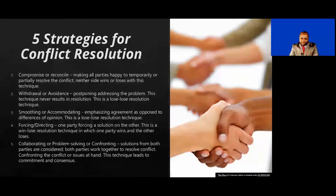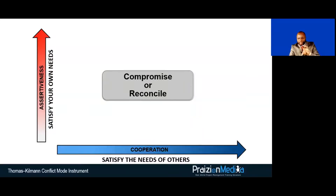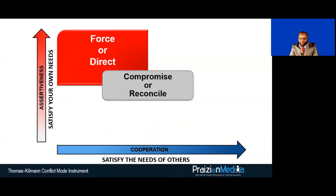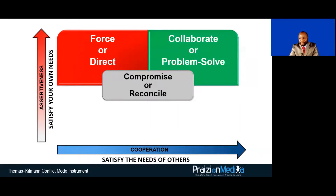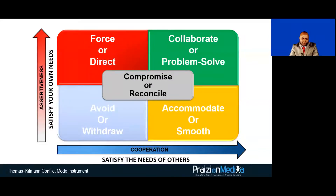To understand this properly, the Thomas Kilman conflict mode instrument shows you that you could be somewhere in the middle of cooperating and being assertive — compromise or reconcile. Or you could be extremely assertive with low cooperation — that's force or direct, perhaps in an emergency. High assertiveness and high cooperation is collaborate or problem solve. Low assertiveness and low cooperation is avoiding or withdrawing. Or if you're thinking all about the other party, you smooth or accommodate — you concede your viewpoint to the needs of someone else.